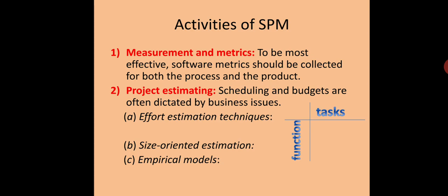And what is the purpose of collecting the process metrics? It is to examine the quality and productivity of a given project, so that you come to know what the quality of a given project is and how productive it is. Now process measures are normalized using lines of code, so that the data collected from various different projects can be compared very easily.